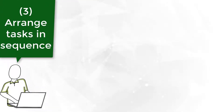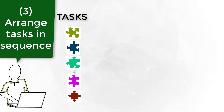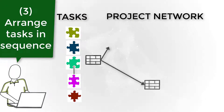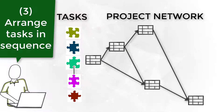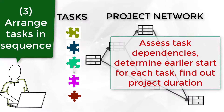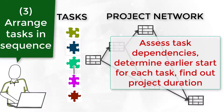Step 3: arrange tasks in a sequence. Putting tasks in a logical work sequence is the next challenge to develop the project schedule. First, you have to find out the relationships between tasks and identify which task must be done before the other. If a task has to be done before another, it is called a predecessor.